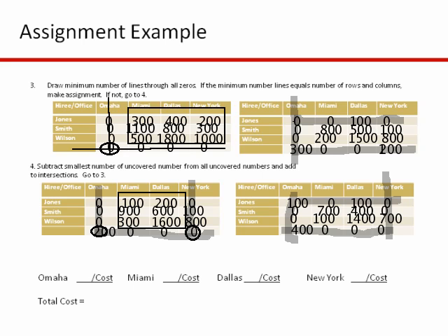Now, to make the assignment, what I would suggest is to go to your last tableau here. And what you're going to do is look for a row or a column with just 1 zero.